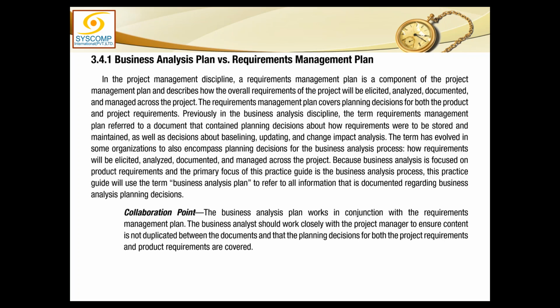Okay. All right. You are very right in saying that, but you see, the requirement management plan you talked about is part of the project management discipline. So you develop the requirement management plan as a component of the project management plan. And what does it describe? It describes how the overall requirements of the project will be elicited, that is collected, analyzed, documented, and managed across the project. The requirement management plan covers planning decisions for both the product and the project requirements. So it is responsible for recording all the product requirements and all the project requirements.